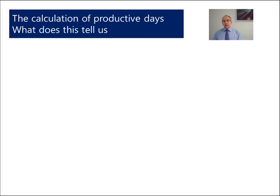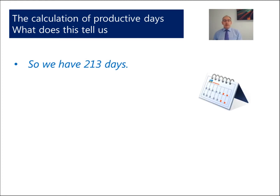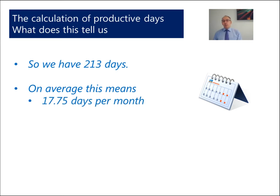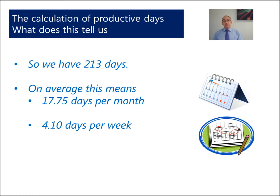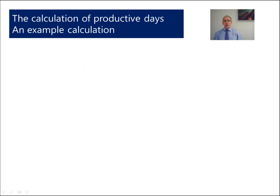Well, what does this tell us? Of our 213 days, on average this means that we have got about 17.75 days per month available for work. And over the year, if we average it out, it is about 4.1 days per week, which is why you may sometimes hear that our team are only productive for 4 days a week. As a percentage calculation, we can see that 213 divided by 253 gives us about 84% of the time.